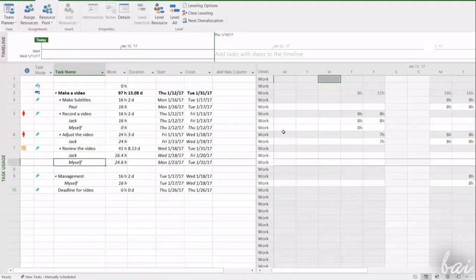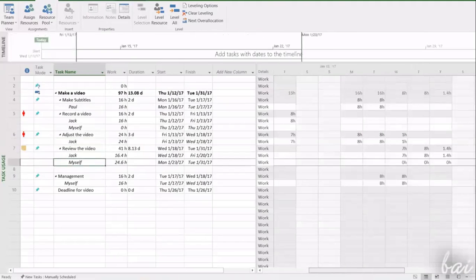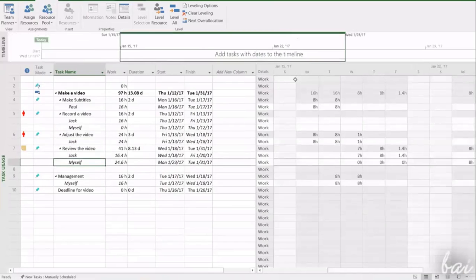By default, each resource can work a maximum of 8 hours per working day in total. In PMI, we normally try to work at 6 hours a day. And in actuality, we might plan for 8 hours depending upon your organization's policies and procedures. But typically, as far as PMI goes, we load a resource for 6 hours a day. Okay, that's a standardized way.